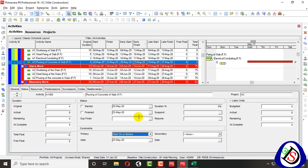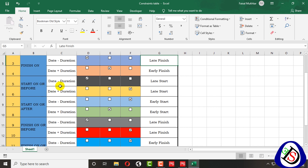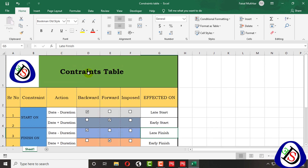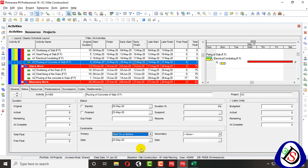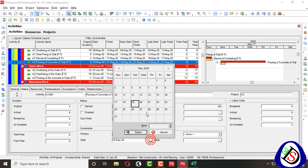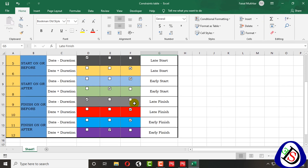Next is Start On or Before. When I minus the duration — the backward pass is affected. For Start On or Before, when I apply 19 May and schedule it, Late Start is affected and moves backward. When I go two days above to 21 May and schedule it, it remains the same as imposed — the imposed date stays as I set it. 'Imposed' means it stays as I imposed it.